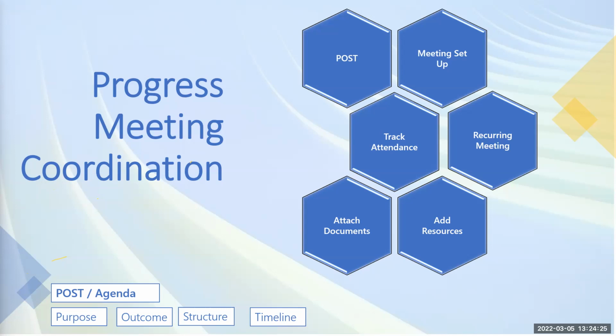So actions need to have due dates as well, to say, okay, this action needs to be done in the next one month. And so that will help you to be able to chase those actions. And then you have a comment section to say what is happening, how the action is progressing. And then you have a status section as well that states, okay, is this action still open, or is it closed, or is it an action that has been postponed? But right now, I don't have a template that I could show you. I could go into my archive and see if there's anyone, but those are some of the information that needs to be in your actions.